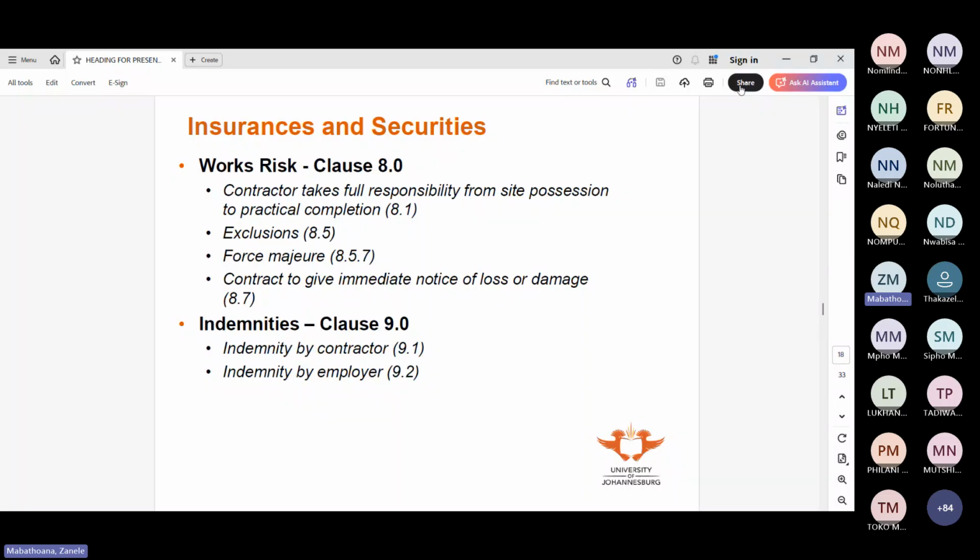This creates a record for the contractor to say, I changed because there was an instruction for me to do so. It gives credence to the change to what was originally agreed. And that change may have a cost impact or a time impact. It could be that it doesn't increase the cost, but it's going to delay something, and I may not finish on the 5th of May, I'll finish on the 10th. And the contractor says, look, I'll absorb the cost of those 5 days. However,